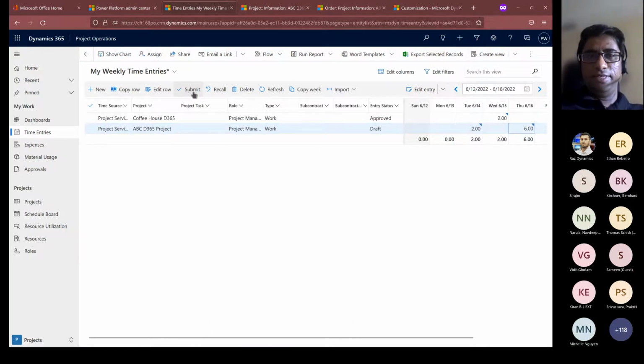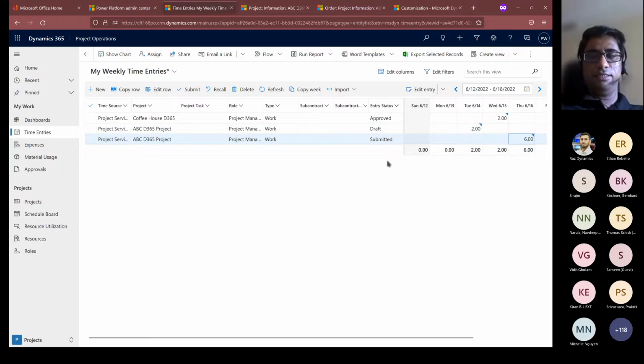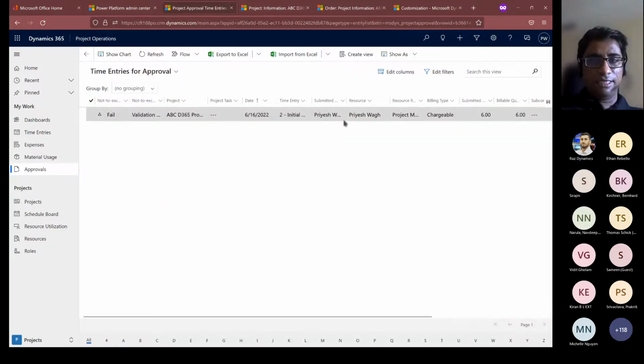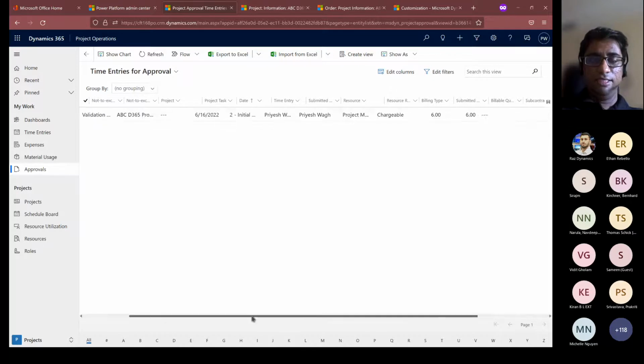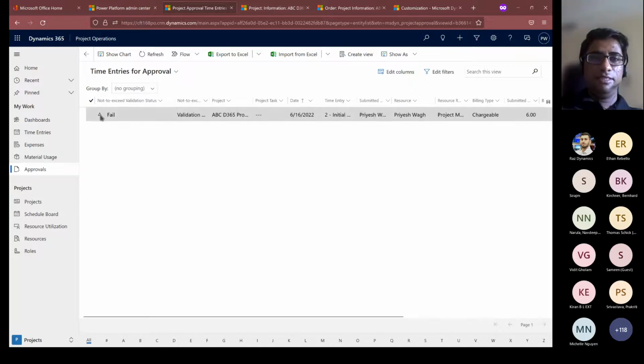I'll show you why I'm doing this right away. If I submit the 6 hours time entry, the billing amount, I think, will exceed the $1,000 limit we had put as the not to exceed limit on the quote, right? Again, we'll revise all of this once we are done with the cycle. But just to reiterate, in approvals, let's say I'm the approver of the project and I see that someone has done a time entry for 6 hours and it's going above the limit, then the not to exceed validation status will be in fail.